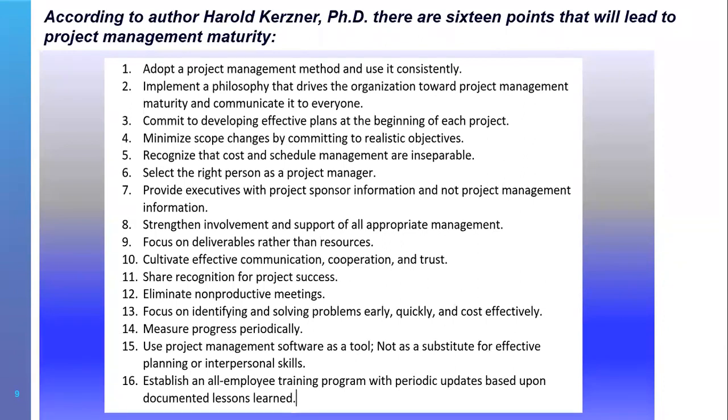And with plan here, I'm focusing on schedule. Having the total schedule for every task, for every meeting, for every session from the very beginning of the project. If something has to be changed in the scheduling, then if you have this total plan in place, you can see the effect that it has. Maybe I can still catch up on the time if I move something else around, or I have to go back to the customer and say, if you don't have time for the training next week, we need to postpone go live by a week or two, because we need the time after it to do the remaining things.